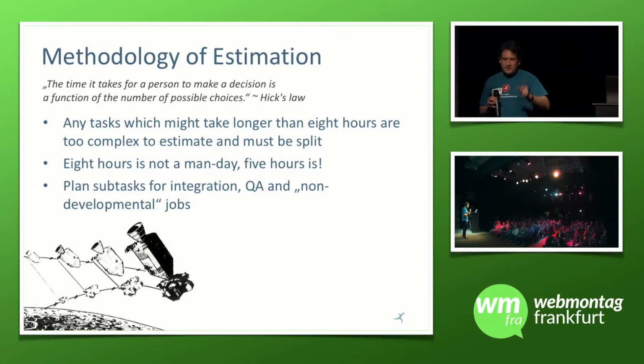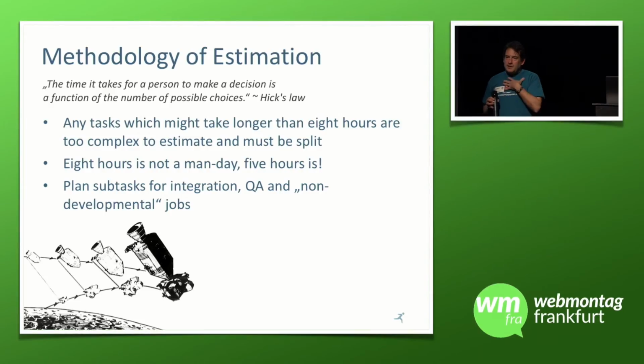Say, "Geez, you know, I need you to stop what you're doing, and the client wants that turned from blue to gray." He's got to stop what he's doing. He's got to check out the new project, make sure his code is up to date, and then by the time he takes that 30 seconds to do, what happens to the 8-hour day? About 5 hours is the maximum you can get out of productive work. And if you have somebody sitting there for 12 hours, let me tell you from experience, after a while your brain just turns a little bit soft, and anything you produce after that time is going to have to be refactored the next day anyways. So it's no longer productive.